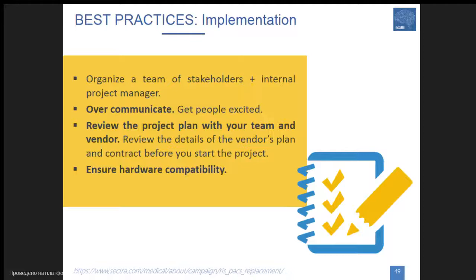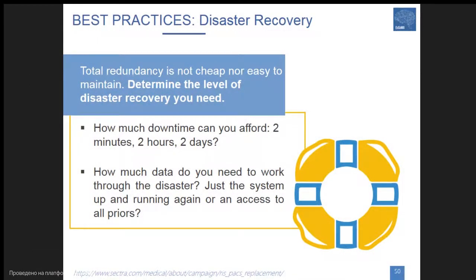The plan of the project should be reviewed with the team and the vendor, and the hardware compatibility should also be ensured beforehand. Best practice for disaster recovery means that you should define the level of needed disaster recovery. How much downtime can you afford? 2 minutes, 2 hours, or 2 days? It depends on the clinical services, the type of the hospital, the type of the medical center. If it is an emergency service, then 2 minutes of downtime might not be affordable.